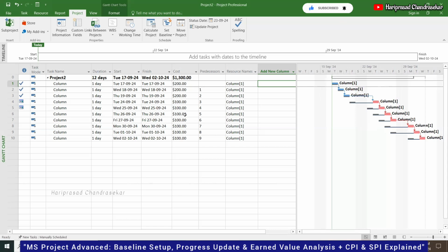Still, if we put a baseline for the entire project. In this PDF, the foundation has five different tasks under it, walls have five tasks, roof four tasks. So each and every set of tasks, can we do baseline assignment, or only the entire project? Entire project, it's not the right way. So for the entire project, you should have the baseline, but we are limited to 10 baselines: baseline 0, and then baseline 1 to baseline 10.